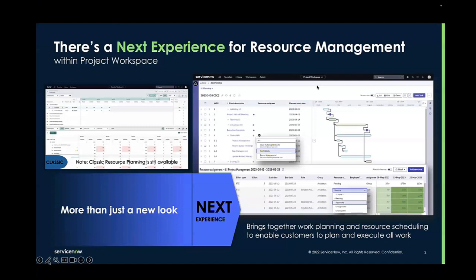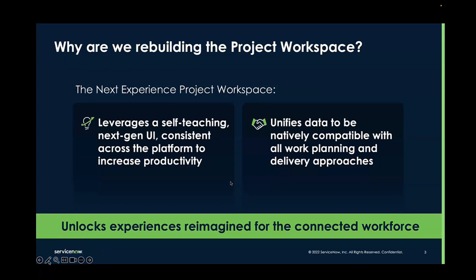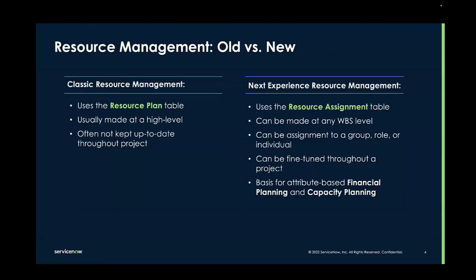There is now a new next experience for resource management within the project workspace with a new look and feel — it is also a total rebuild of the project workspace to make it easy to use with all new functionality. The new project workspace leverages a self-teaching next-gen UI consistent across the platform to increase productivity, and it unifies data to be natively compatible with all work planning and delivery approaches. Notably, the classic or legacy resource management experience uses the resource plan table, while the new resource workspace uses the resource assignment table — which has more functionality and is also the basis for attribute-based financial planning and capacity planning. Resource assignments can now be made at any work breakdown structure level.